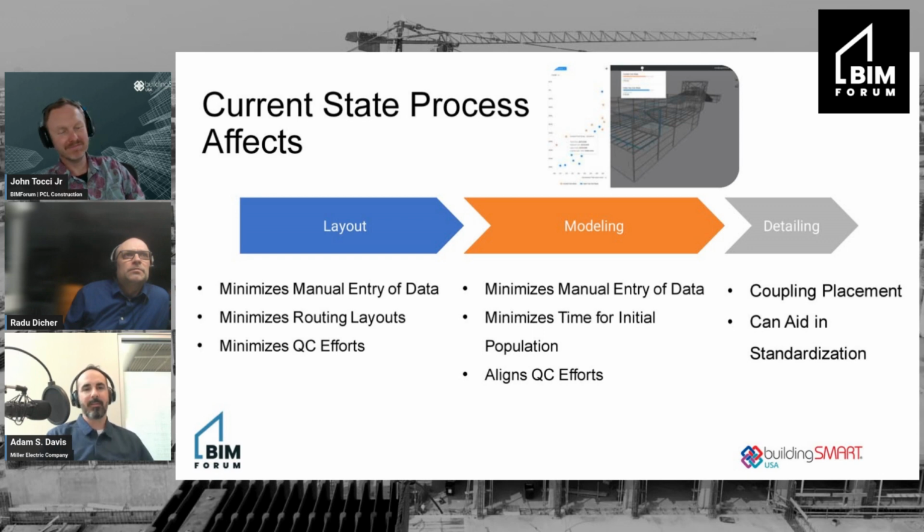Yeah, I think that an electrical design company would benefit from having a tool like this. The distribution project was a design assist job where we got engaged as an electrical contractor. We started rearranging potential locations for all of the electrical equipment inside of a 50,000 square foot floor plate. So we took some scenarios and priced some scenarios of moving that equipment around.